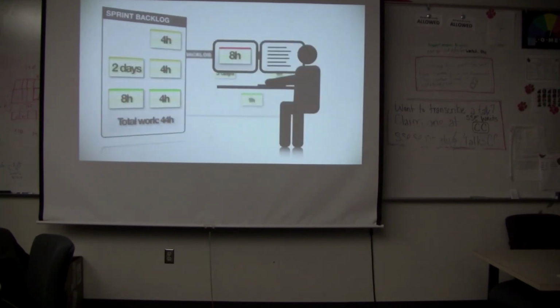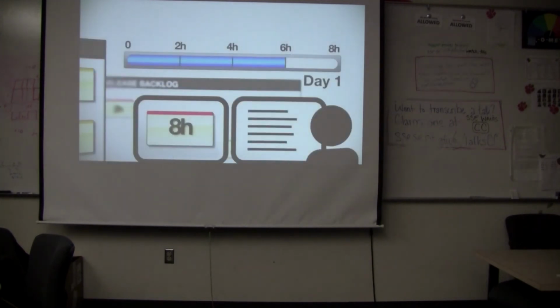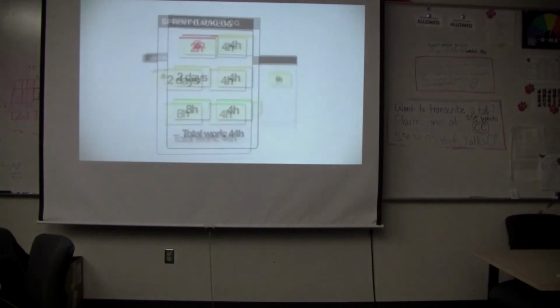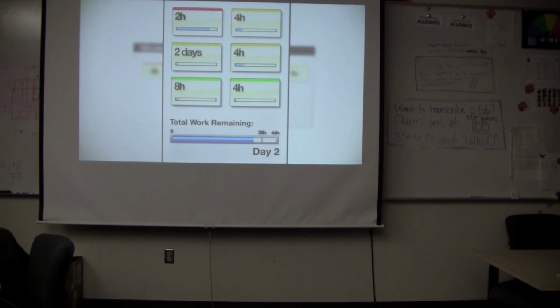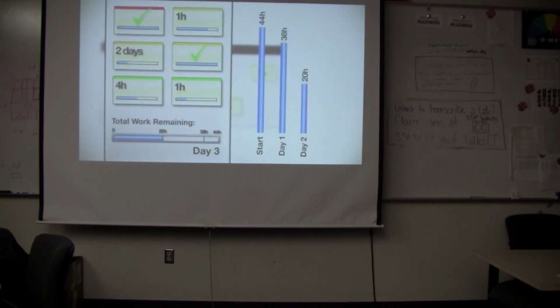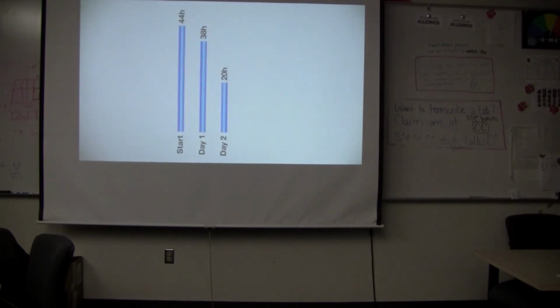As each team member goes through and makes progress on one or more of the user stories, they simply update the amount of time remaining for each of their own items. So the total amount of time remaining on the group of user stories that make up a sprint changes on a day-by-day basis, hopefully going downward until it hits 0 when the sprint is complete. The burn-down chart aggregates the remaining work data and shows it visually. It's brilliant because it communicates a massive amount of information in just a few seconds.